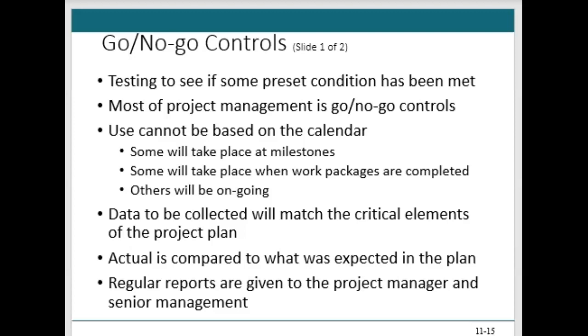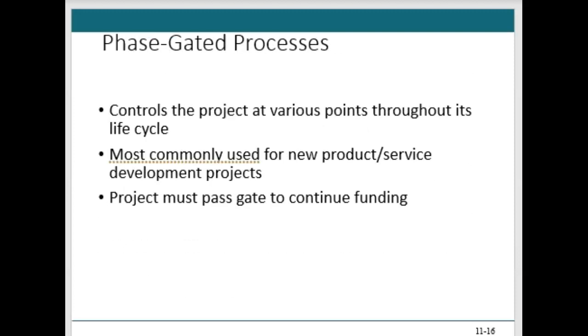So when we're considering these go, no-go controls, the project plan, the budget, and the schedule are all control documents. So we as the project managers have to design this system to satisfy the controls that we're looking for, the standards, and the milestones around them. The controls really should be linked to the actual plans that we're working on and to the occurrence of real events, not simply milestone events. That's one of the problems with a milestone is it's tied to really a calendar event, right? And we want to move beyond that in terms of real control.